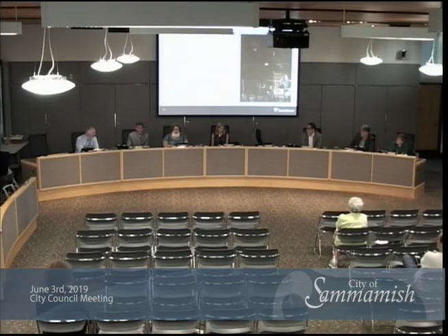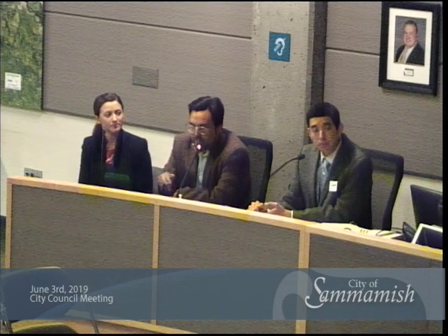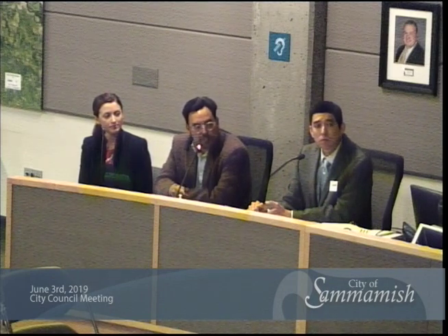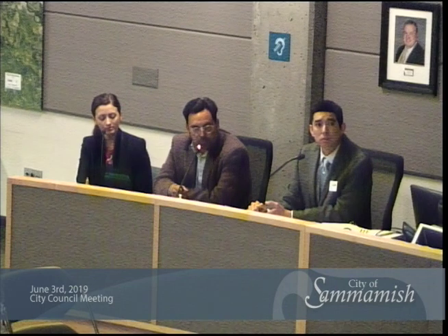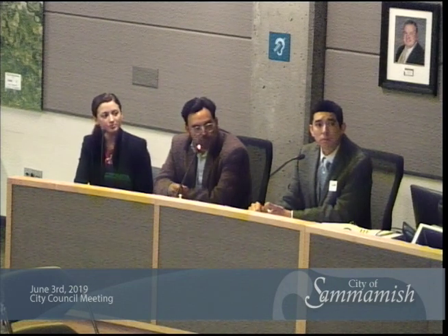Okay, thank you. Councilmember Hornish. Do you have any feeling yet for how many levels you would need to build up to get 200 parking spots? I would say that we haven't run that exercise, but we're about to do it. We're just using the standard 350 square feet per stall, and then we would try to understand where the access points are first and see what kind of ramping we can do. But I'm pretty confident that it would be no more than 3 floors.